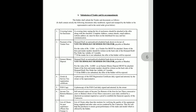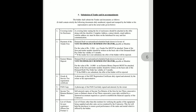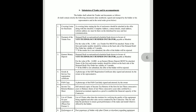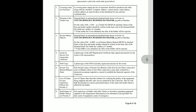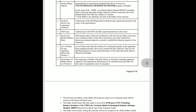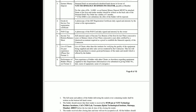For how to submit the tender: first, a covering letter with enclosures; then payment of the tender fees; earnest money deposit; goods and service tax certification; PAN copy; income tax return or balance sheet; list of clients for past experience to be filled in format number 1; and performance of the bidder to be filled in format number 2.